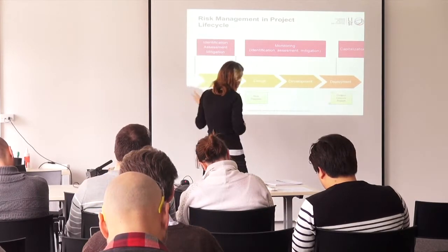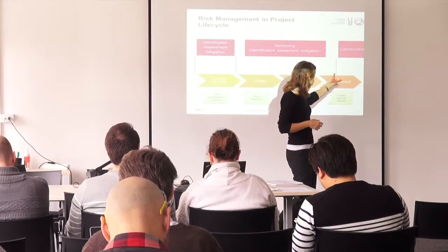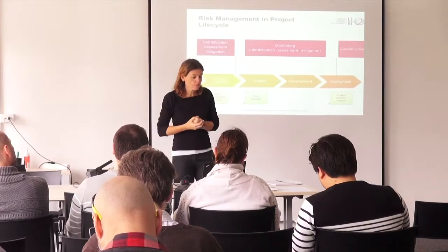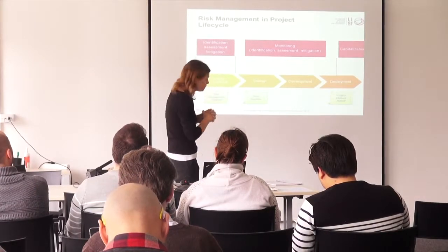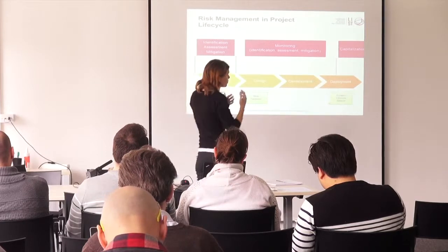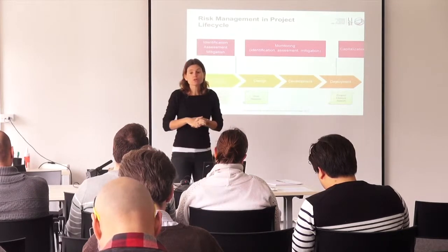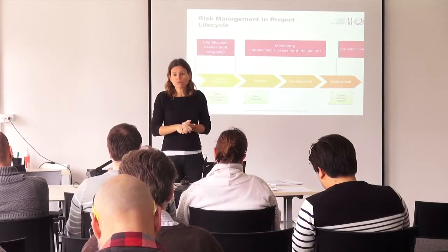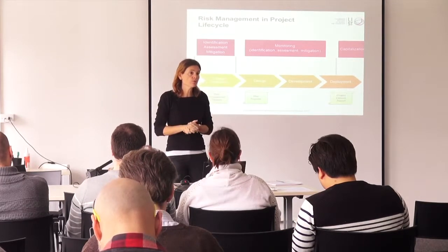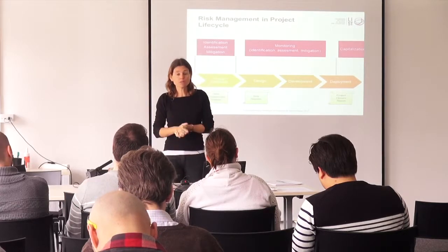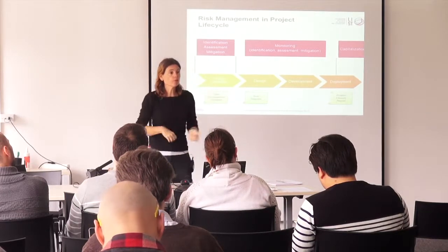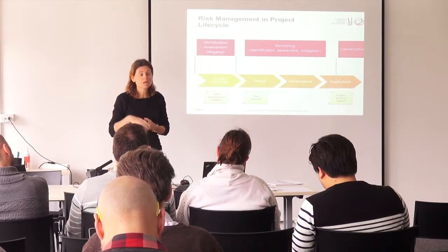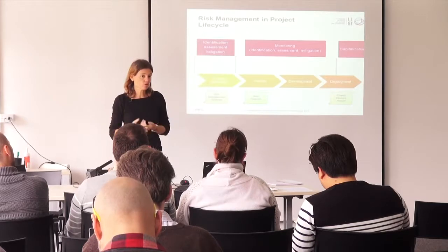And then by the end of a project, you might want to spend some time on the capitalization activities, and there you might have some project closure report or some feedback document, whatever you call it, that will say, this is the thing we've done during that project, comparing your budgets and your estimations against the actual figures, and trying to gather some lessons learned.